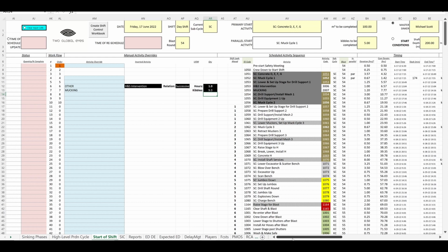There are 3 to choose from. Muck cycles 1, 2, and 3. We choose the one with the most slack. Slack is created when activities are in parallel. It is an unscheduled capacity available to an activity, or said differently, the length of time the activity can be delayed before the schedule starts slipping.